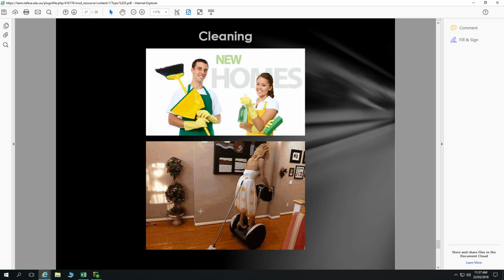But there's another process in there which is not covered, which is the client inspection. So we have our cleaning, and then the process of handover includes a walkthrough with the client and a bunch of little red sticky circles. They'll go, oh yeah, look, that screw, that's a shocker. Put a red dot there, work through, place their red dots about the place for things that have to be rectified, for things that haven't been done to standard. That should also be accommodated for both in your financial planning as the builder and in your scheduling as well.